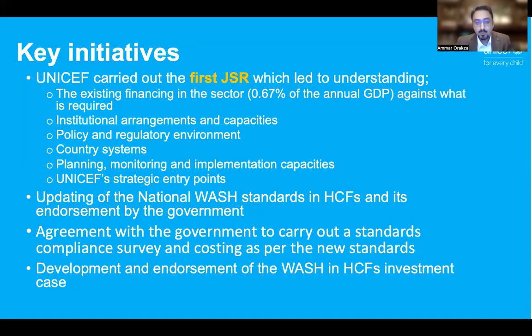Out of this, around 136 million were CAPEX, and then between 180 to 224 million was recurrent cost. It also highlighted that the biggest share of investment is needed at the primary healthcare level, around 68%. At the secondary level it was 13%, and the tertiary level was around 19%.